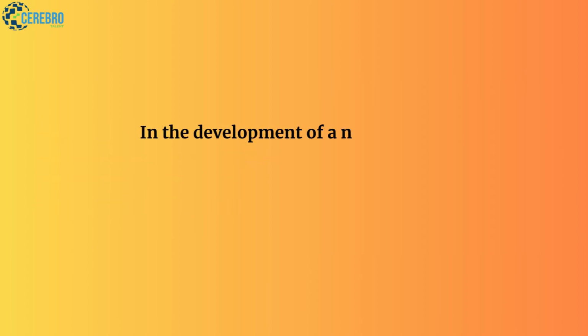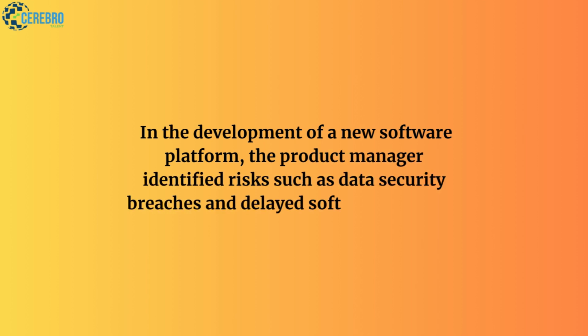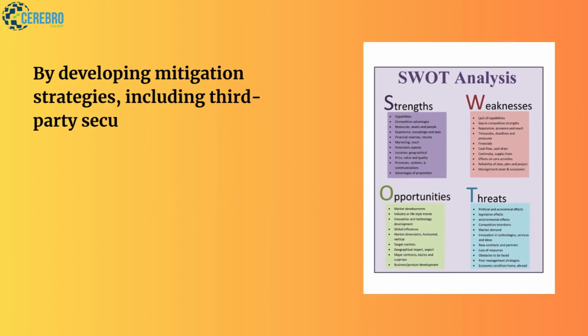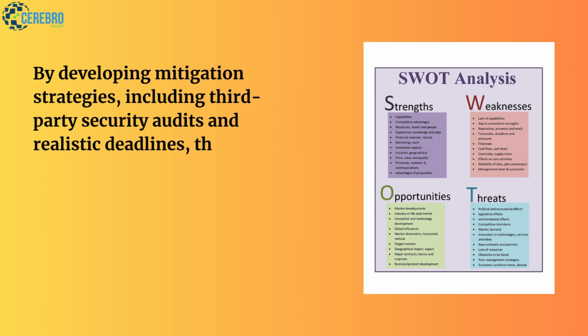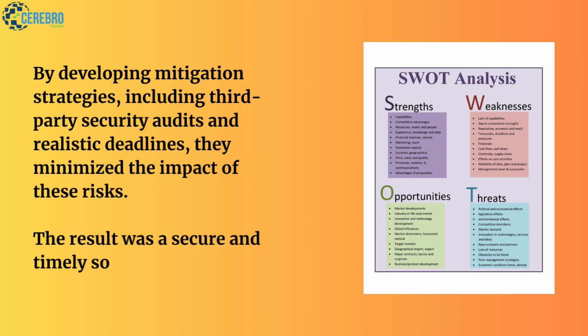In the development of a new software platform, the product manager identified risks such as data security breaches and delayed software delivery. By developing mitigation strategies, including third-party security audits and realistic deadlines, they minimized the impact of these risks. The result was a secure and timely software launch.